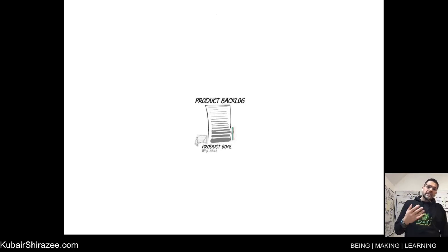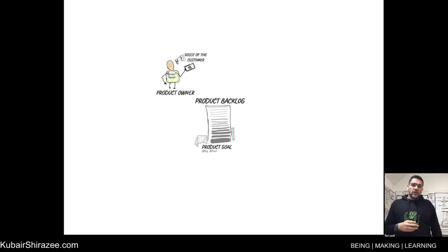The product backlog is a living artifact. It is emergent over time. As we deliver new increments of value, each sprint we learn more about the product and its market, and put these new learnings into the product backlog to help maximize the value we want to deliver in the future. The product backlog is owned by the product owner, first of our 3 accountabilities.